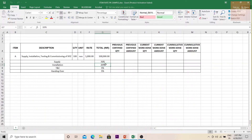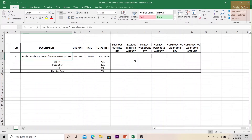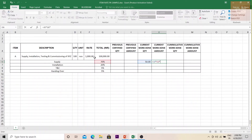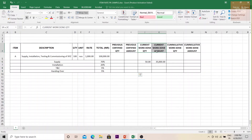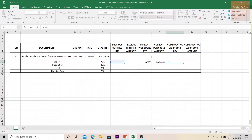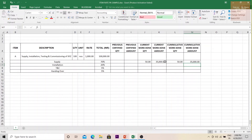At each stage of work being carried out, only that stage's percentage of the rate can be claimed. For example, in the first invoice, 50 numbers of material have arrived on site. The amount claimable is 50 × 70% × 1,000. The previous certified amount is zero since this is the first application, so the current work done equals the cumulative. The cumulative quantity is previous plus current, and similarly for the cumulative amount.